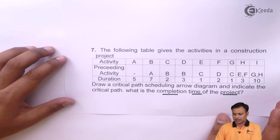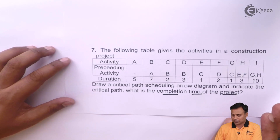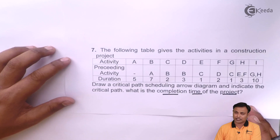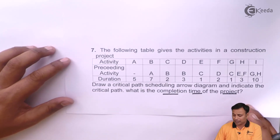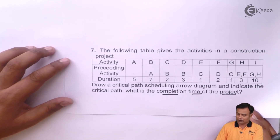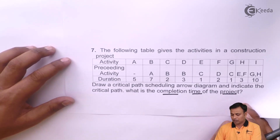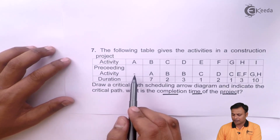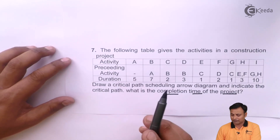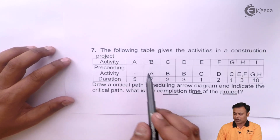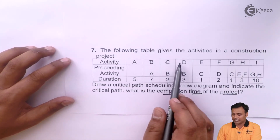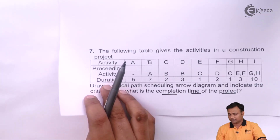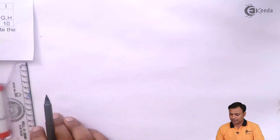First we will focus on drawing the network diagram or the scheduling arrow diagram, and then we will learn how to identify the critical path and how that helps to calculate the completion time of the project. Activity A has no preceding activity, so A is the initial activity. After A we have B, and after B we have C and D. Let's draw up to that point first.